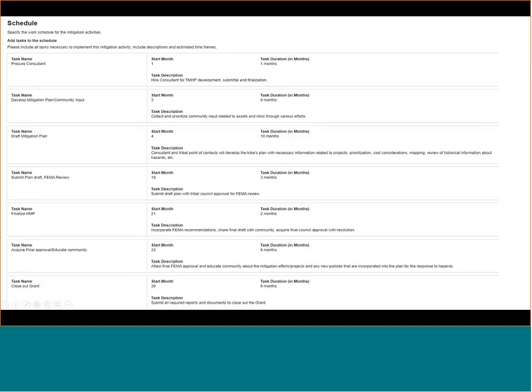All right, so here on your screen, you're going to see a sample schedule. And this is in the FEMA Go, FEMA Grant Outcomes system, where our BRIC applications are required to be submitted. So you can see the first task listed is procure a consultant. That first month, they're going to look at doing that, and it only takes a month for them to complete. They're hiring a consultant, maybe through an RFP, to write that plan or perhaps do other portions of the plan.